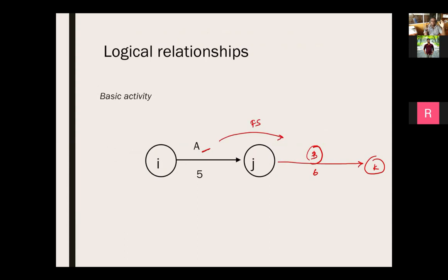It's a network that you're going to discuss, as I've shown you earlier in a previous slide. So these are dependent activities. Activity B is depending on activity A. We have to finish this activity to start this activity.